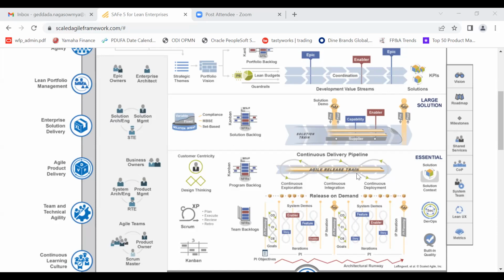There will be Scrum team meetings, PO syncs, and Scrum Master syncs. We'll share our ideas, like what dependencies my team has on Ravindra's team, or on Gupta's team. Let's work on our dependencies, raise the dependency, get approval, and say when you are delivering. This kind of sync will happen across these 3 teams under the same solution they are working on. This is called an Agile Release Train. The teams falling under this ART, we call it the Agile Release Train.